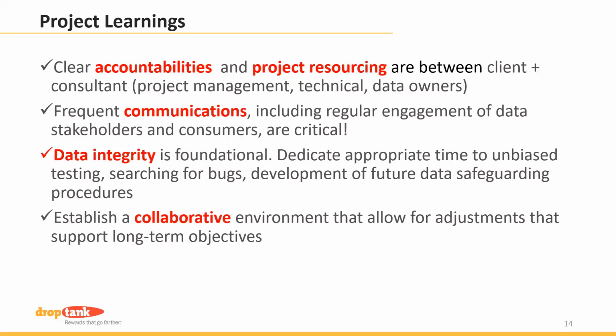That 12 months, if we were totally focused, to be honest with you, we probably could have shrunk that in half. We didn't have the luxury of doing that. So that's something that you just need to be conscious of, is what else is going on in your company, and do you have the right people in place to deliver the project.